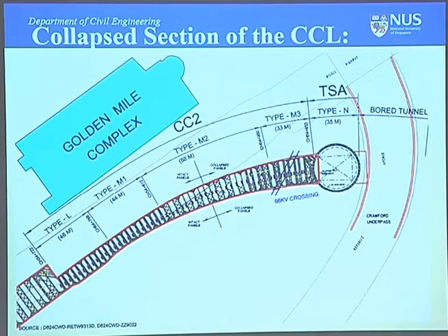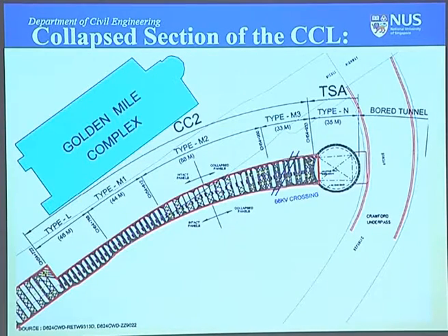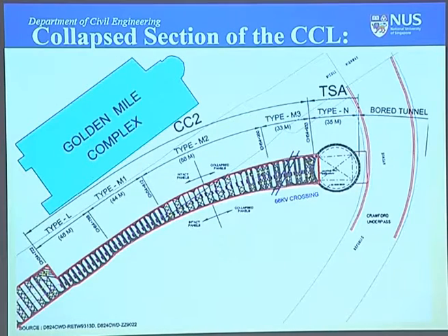That diversion and the rebuilding process cost Nishimatsu, the Japanese contractor, somebody was telling me the estimate was something like 350 million US dollars. And they had to sell property in Japan to pay for that. And they were barred from construction projects in Singapore for 3 years.